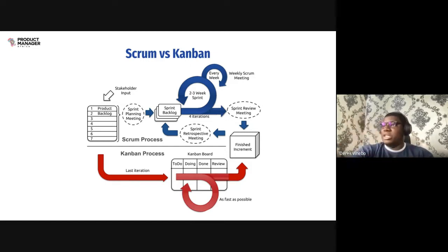The next time you bring in maybe 38 story points, they deliver 32. What you do is that after like three stable sprints, you want to take the average to determine what is our team's velocity. So you can easily say, okay, you know what, our team can only deliver 30 story points currently. So you try not to put in more than 30 story points next time.